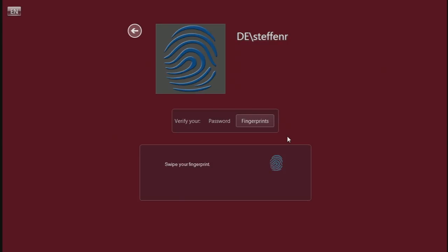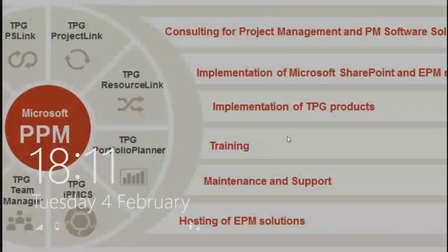When you've got a mirror task, what causes it to be refreshed in the driving project? The standard is that the owner of the project has to do it manually. So he has two choices. He can go into the project plan and say, update all links, without reviewing what happens. He can go into a tool that says show links, that shows him all links, and he can say, okay, give me a preview of what happens.